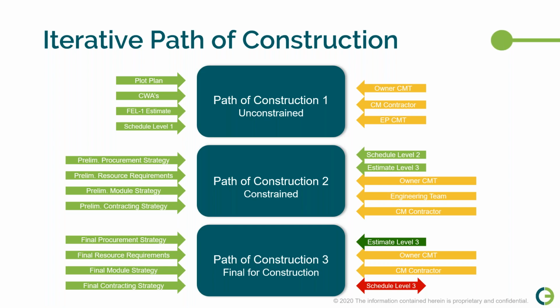You know, if you're going to have to pay an extra $100,000 for a premium cost for a piece of equipment, and construction says, well, yeah, it'll save us time, but it's only going to save us a day, that's probably not worth it, right? So you can look at it as value to the project. And critically, don't forget commissioning and startup. The project isn't done until it can be turned over and started up. So make sure that system completions play an active role in the discussion.